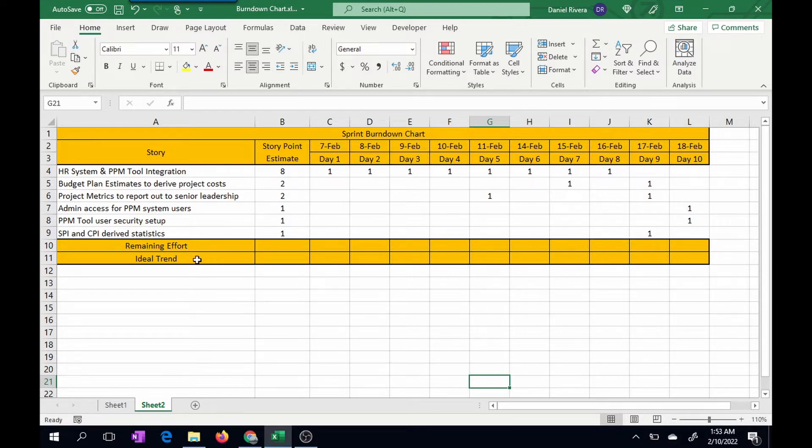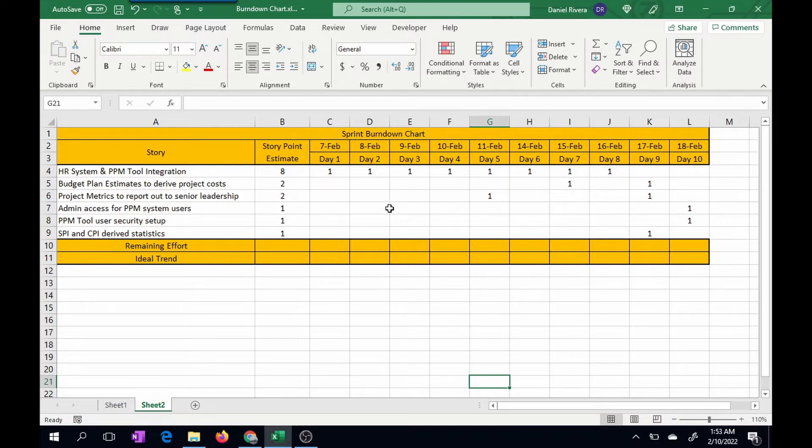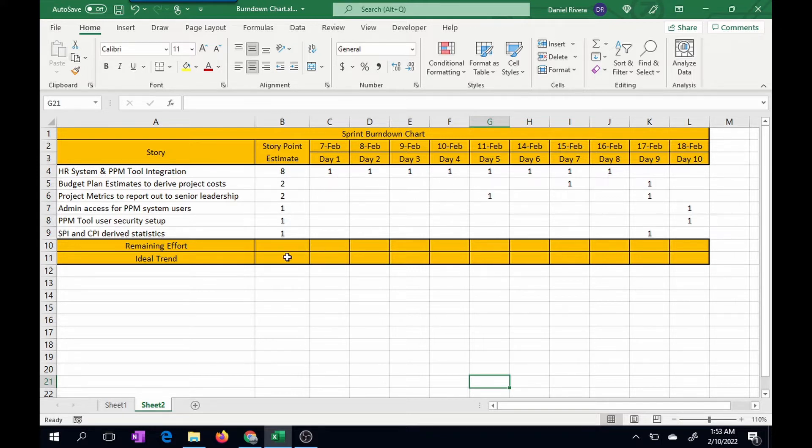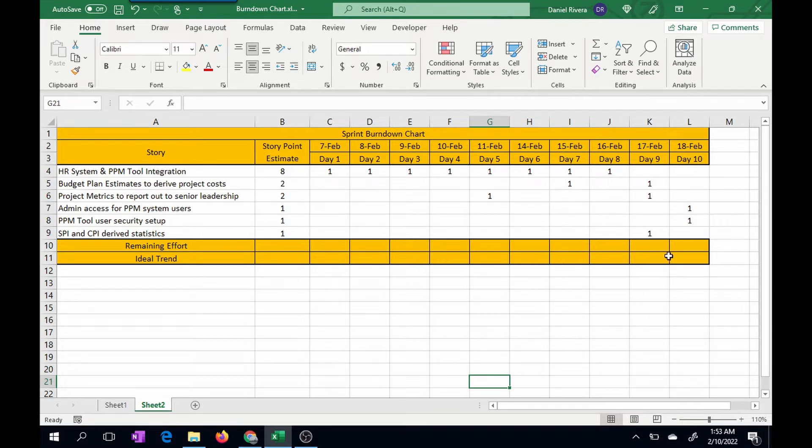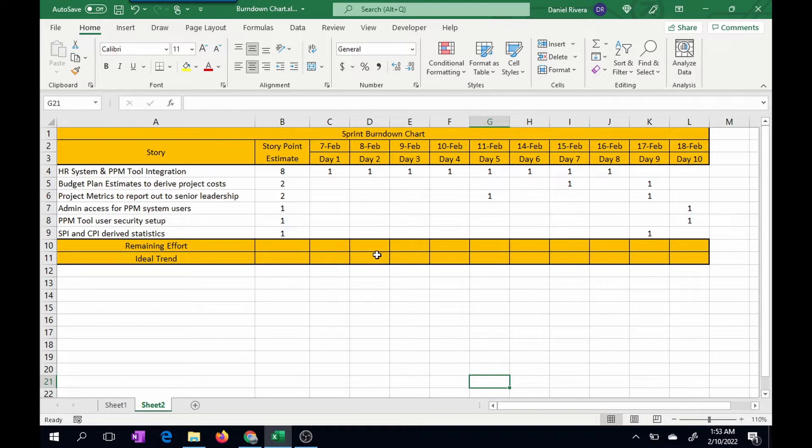The ideal trend number is a standard calculation. It doesn't have anything to do with the completed story points. What this is, is just a trend that your project should be taking as the sprints are burned down. For example, if the trend number is 10 and your remaining effort is 11, that's saying you're a little bit behind on your execution by one story point.